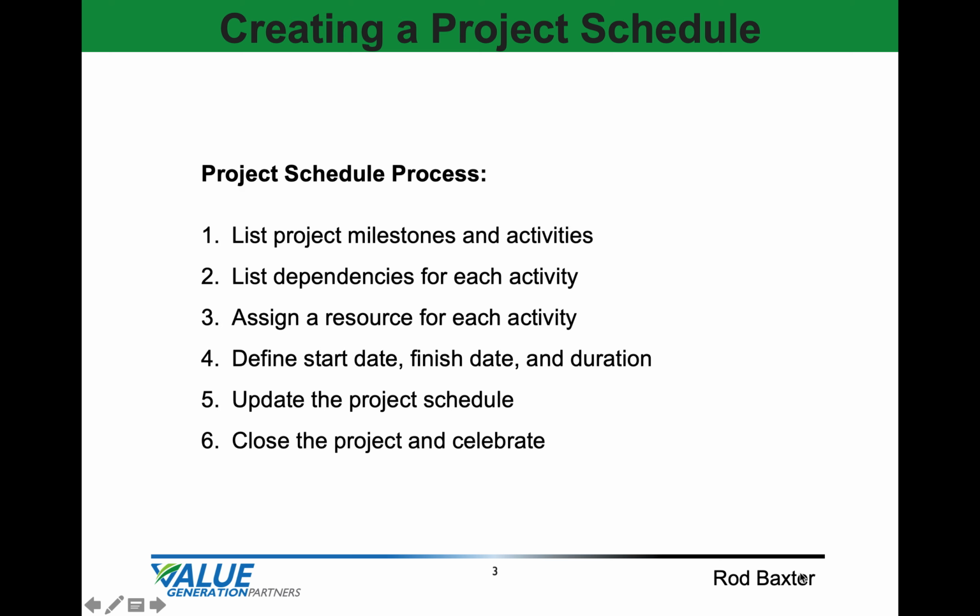The start to start. Predecessors must start before successors can start. The finish to finish. Predecessors must finish before successors can finish. The start to finish. Predecessors must start before successors can finish. Assign a resource for each activity. Define the start date, finish date, duration for each activity.